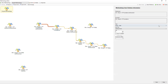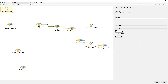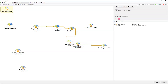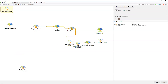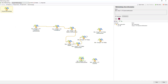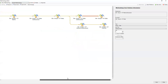All these relation types can be changed — you have different types: start-to-start, start-to-finish. Based on type, the system automatically changes the color so you can visually differentiate relation types. For any type, you can specify the lag between two activities. After the completion of slabs, we can execute walls and columns at the same time. We're going to create this kind of relation. I can click auto-arrange and the system rearranges these activities. So practically, we've created the workflow of these activities.